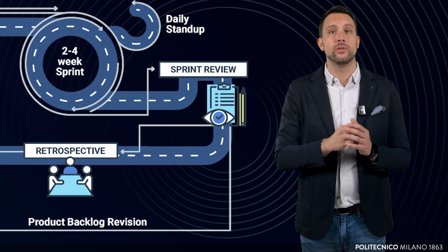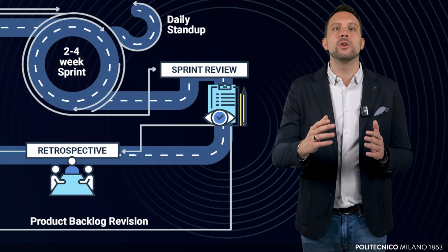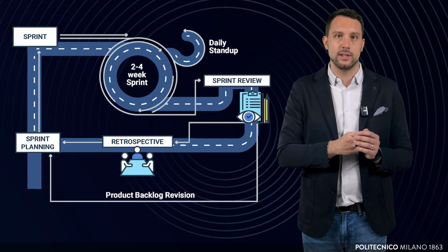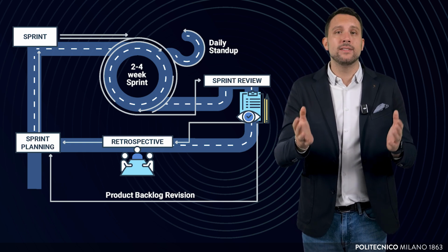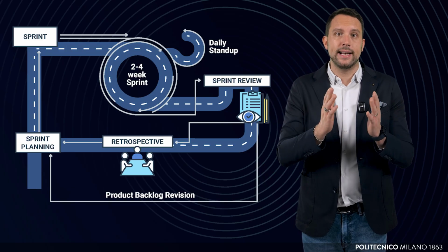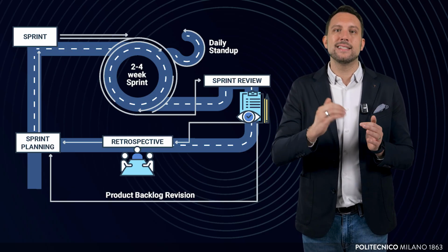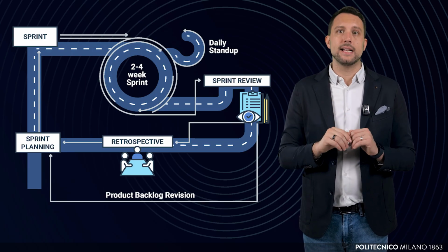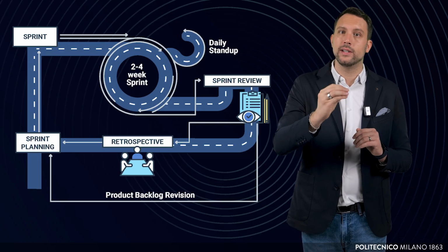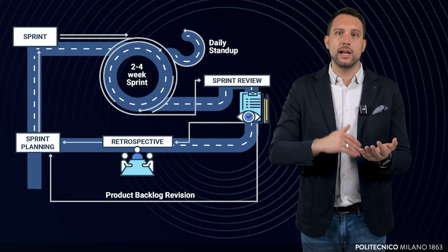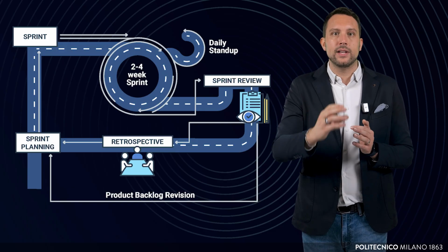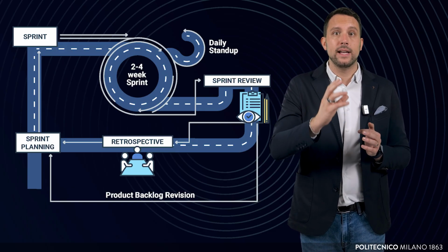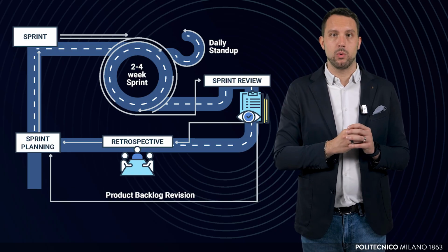within the sprint scope. At the end of the sprint, the team demonstrates the completed features to stakeholders in a sprint review. Feedback is collected and incorporated into the backlog for future sprints. A retrospective follows, enabling the team to reflect on their processes and identify areas for improvement. This cycle repeats, with each sprint building on the previous one. For instance, subsequent sprints might focus on integrating video streaming, adding progress tracking, and refining the user interface. The iterative approach ensures that the product evolves in response to stakeholder needs and emerging requirements.